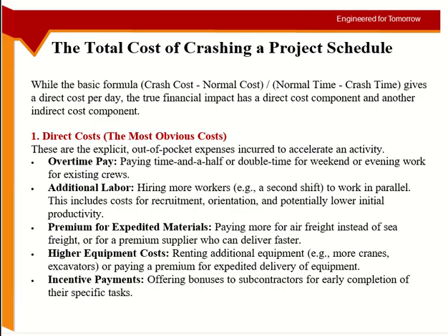Extra hours would mean evening, night, so you need lighting as well. So it's not only the direct cost. When you have direct cost, you have the indirect component, which is also increasing. You are hiring additional labor, additional people. To hire them, you need to call for an interview, put an ad or something. So this will take extra cost, indirect cost.